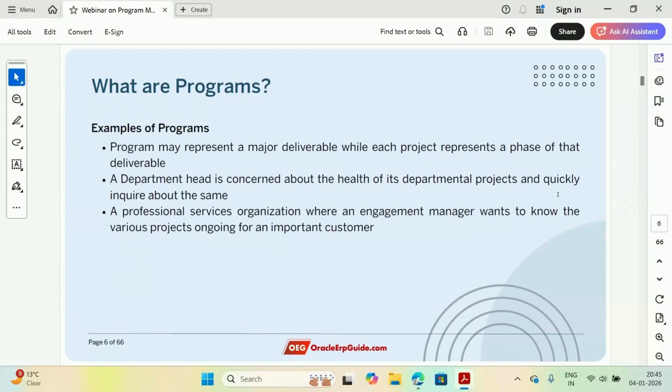entire project, right? So if they want to implement this, they will say that my project number one is completion of tower one, which will be a deliverable. So what is the deliverable? Tower one is the deliverable. Okay, then phase two or project two is the completion of tower two, which will be my second deliverable. And similarly, third tower and fourth tower. And finally, once all the four projects are completed and delivered, there is a program which is basically above all this, which is the delivery of the entire residential project, right? So this way the programs are structured.